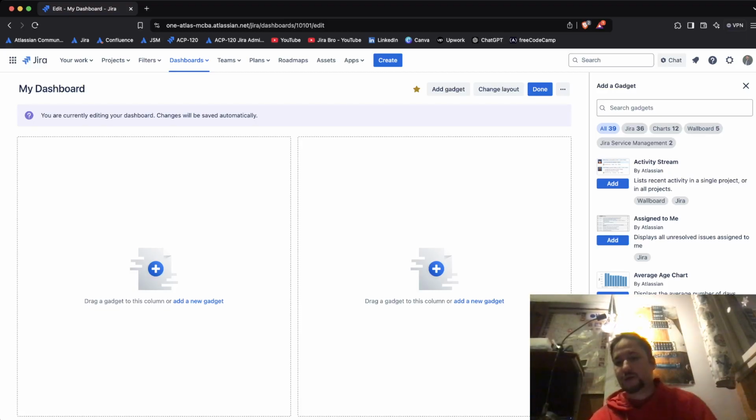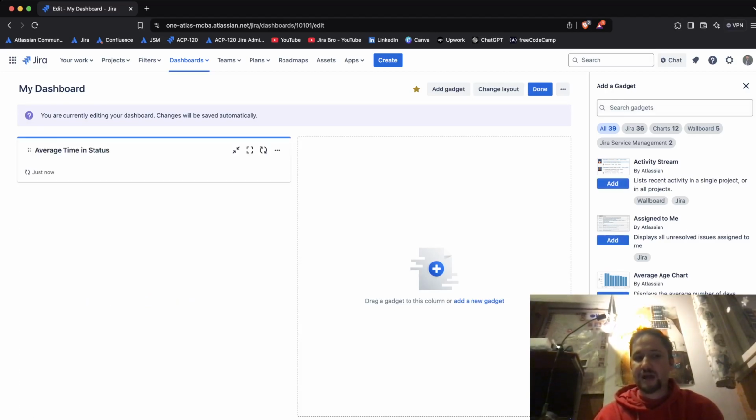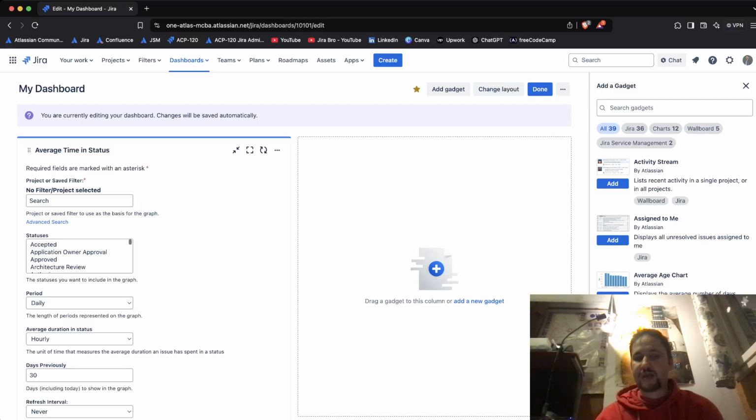So for example, I'm going to say average time in status, and within the average time in status I'm looking for a specific project, the project mobile dev, and I want to see the specific status, which is going to be in progress, and I want to see this weekly.